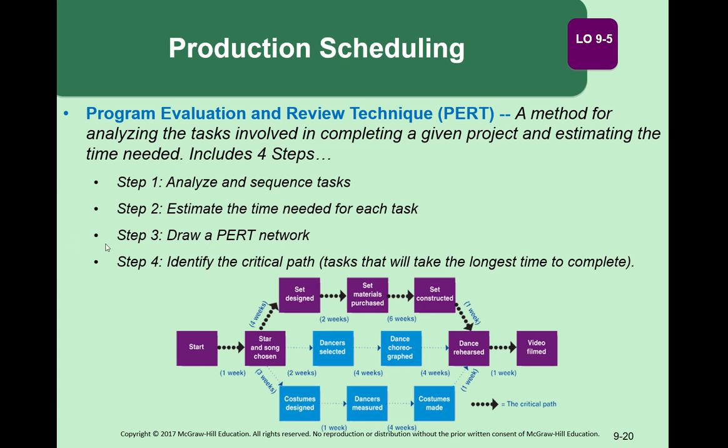When you're looking at your plan, you also need to identify your critical path. Now, your critical path isn't the most important piece of it. Your critical path is the part that is going to take you the longest. So, for example, if we go along this path here, where they diverge, this one is 3 weeks plus 1 week, that's 4 weeks, 8 weeks, 9 weeks. Versus here, it's 4 weeks plus 2, that's 6, plus 6, that's 12, plus 1 is 13. So this path right here, the one in purple, is the one that's going to take us the longest. So we might want to get a head start on that first, and we can ignore these other ones for a little while and put them on the back burner.